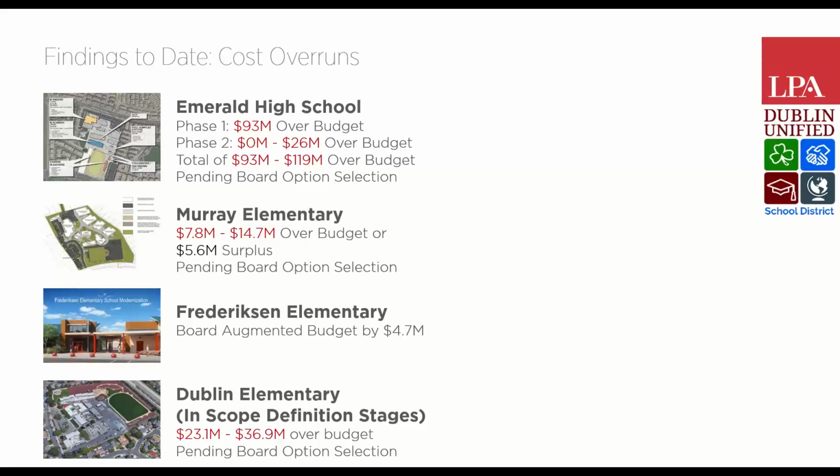Then we're adding our program costs, which typically run between 30 and 35%, and then also any offsite improvements or a per acreage cost for developing the grounds. So going forward, I feel like our numbers are going to be pretty accurate.